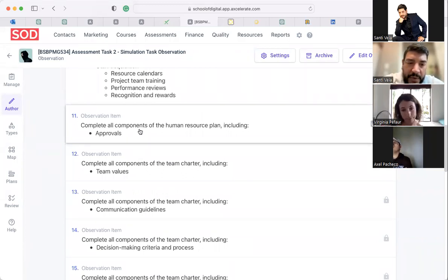All right. When we have a document in project management, let's say that the project document is called the project charter, or let's say that the project document is the scope of the project, or let's say that the document is the WBS, and that document has been approved. Who approves those documents in project management? What role? The sponsor. The project sponsor approves the project baselines, of course.